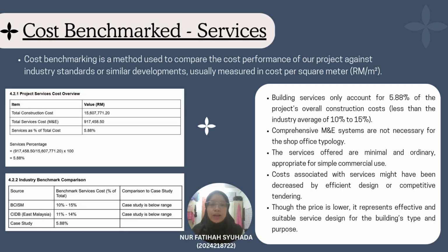In this part, I will be presenting cost benchmarking for services. Building services for this project only account for 5.88% of the project's overall construction costs, which is substantially less than the industry average of 10% to 15% for comparable buildings.